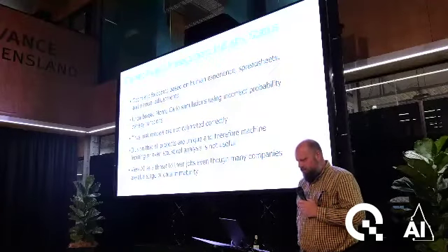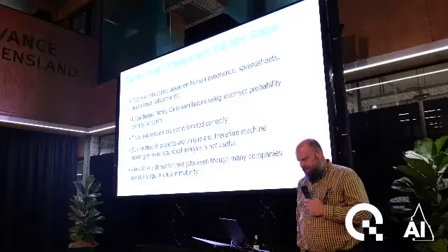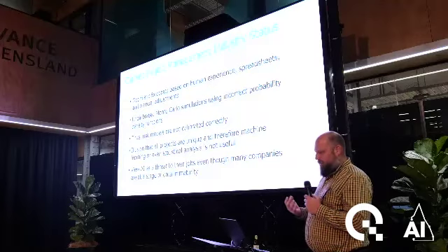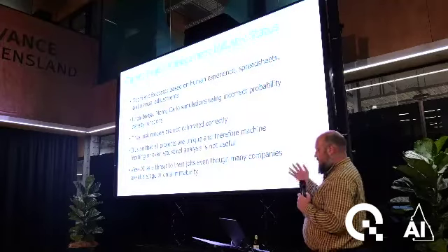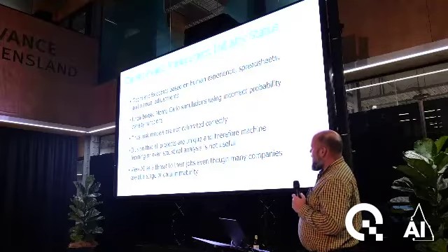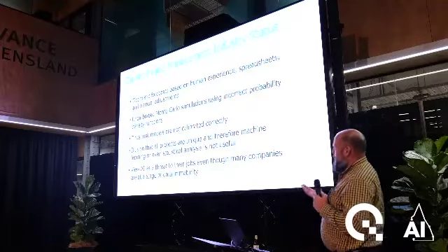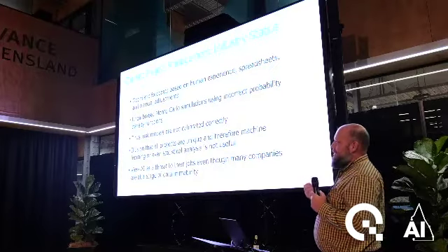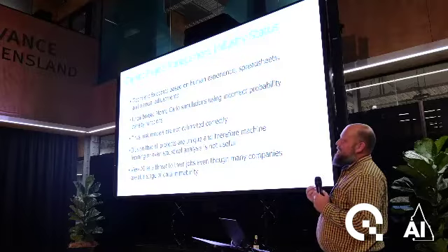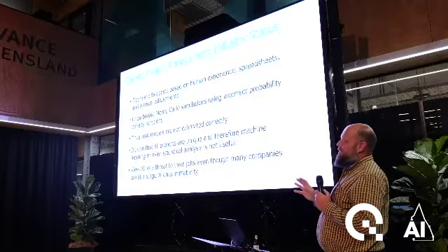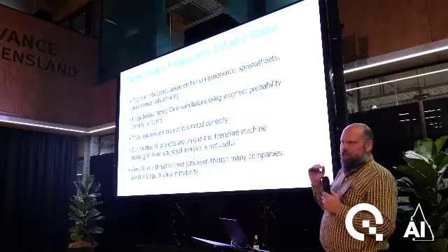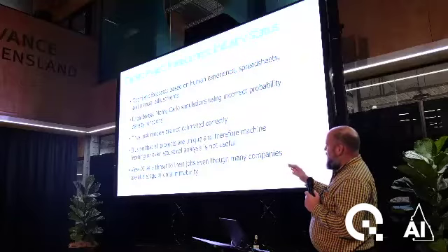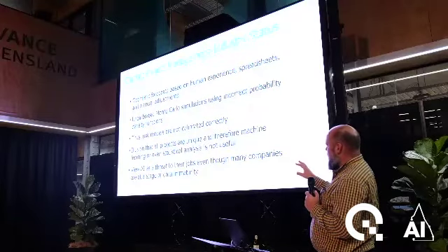As a result of that kind of behavior, they'll use Monte Carlo simulations, but they're uncalibrated, or they don't have the correct probability density functions. This means that the risk models aren't calibrated correctly. One of the problems they have is this dogma where they believe all projects are unique, so there's no use in doing historical analysis, back testing and checking things. Another problem is that they view AI as a threat to their jobs.